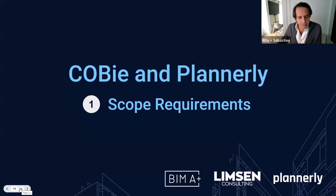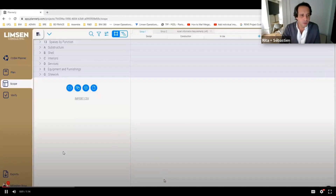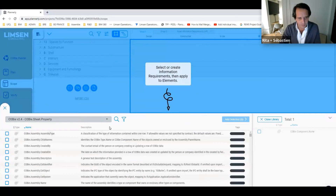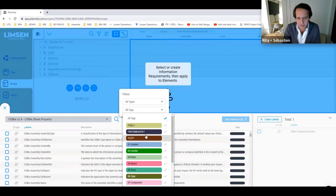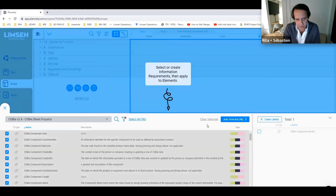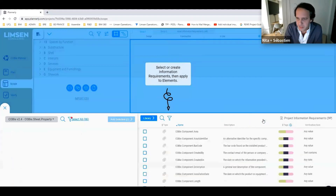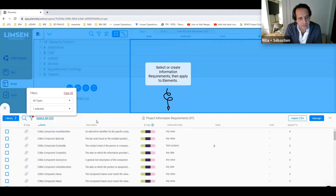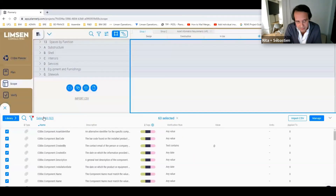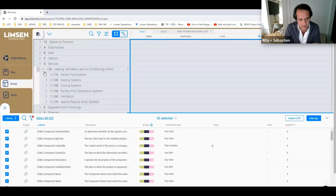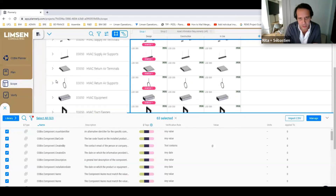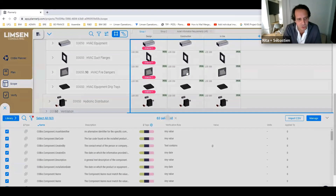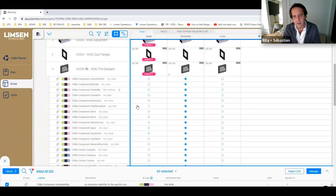This is on the plan part of Plannerly. Now we're going to discuss the scope requirements, so we're going to the scope module. As Clive showed previously as well, we're going to the library COBE version 2 spreadsheet. I'm going to filter it - we have here the filters that we were discussing: full, intermediate, and light. Full would be for the construction phase with the entire scope. And now I've just added all those requirements into my project, and I'm going to filter by intermediate and select all the requirements for intermediate. But here, of course, you should select exactly what you need per object. Taking a mechanical equipment and assigning all those COBE requirements - if I expand it, you will see that the requirements are here on the construction phase.